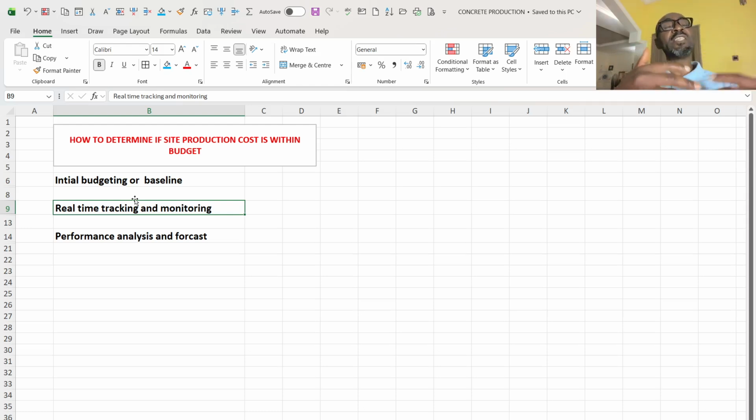If it is a negative variance, you trace back to see if there are errors in your analysis, and if you can't find any, it is an obvious error that you cannot shy away from. The next thing is to use your actual computation to forecast the remaining job. And if it is a positive variance, which means you are in order, what you need to do is just keep it up to ensure that you don't go beyond the budget.